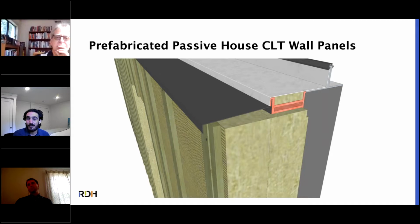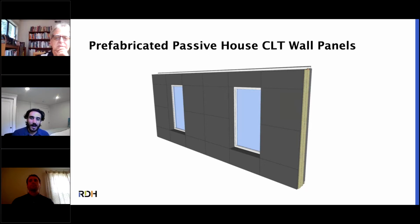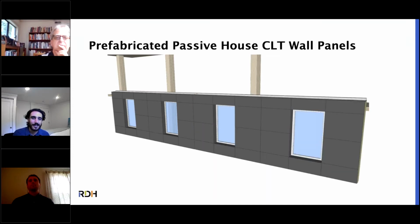This is attractive because wood is environmentally friendly. With the CLT panels, they can come huge. So here they're applying some gaskets and insulation to our joints. We treat it like curtain wall. We've got to build these units off-site and crane them onto site, then we kind of seal them together in the field. It's a similar process to a unitized curtain wall, really. That's the process we're mimicking.